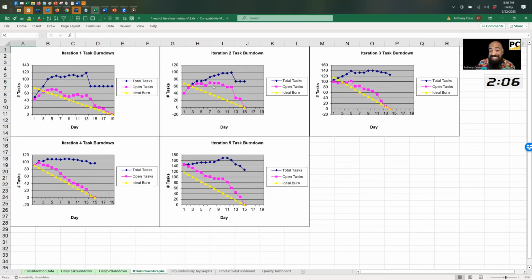Well, gosh, they weren't prepared for that. If you were to stretch this yellow line out to 19, the pink line would come down, right? Get closer to yellow. So the fact is they were adjusting to a new cadence, and of course there was an impact. But then look at their third sprint. Wow, they're getting a lot of stability now in their blue line. Their pink line is now in line, and they're doing a 3-week sprint. It looks like the experiment helped them.